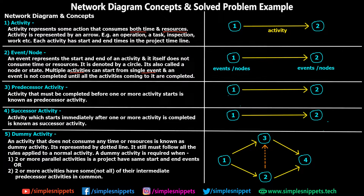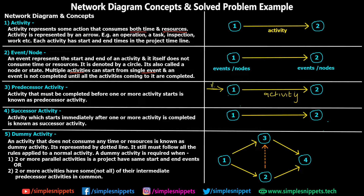Next we have the concept of Predecessor Activity — an activity that must be completed before one or more other activities can start. As seen on screen, one activity can only begin when its predecessor activity is completed first. In a project, tasks are usually assigned in a chronological order and you have to follow that order, because you cannot complete one task if it depends on another task that hasn't finished yet.